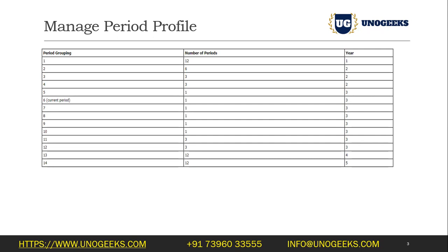Then when I'm reaching the deadline, maybe every month. Then when the deadline has crossed and you have successfully deployed the project, again once in a year I can showcase what all are the profit and losses, what is the progress of the project, what is the forecast of the project. So all these financial reports and analysis you can do at any stage of your project. For that, these period profiles are given. So period profile suggests to the system that you can group the periods in a certain format.